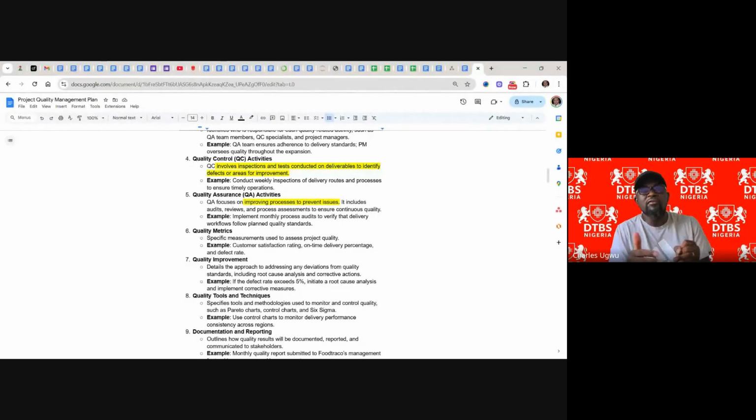So when we're having such deviation, customer rating will go down. And when customer rating is going down, we might say, okay, all the customer ratings are going down. Why are they going down? We don't know. We can say, okay, let's find out. How do we find out? We use a technique called root cause analysis. We use root cause analysis to drill down, and maybe when we're drilling down, we'll find out that it's because one delivery man or some delivery or all our delivery men has not been meeting the standard. They've been short of our standard.